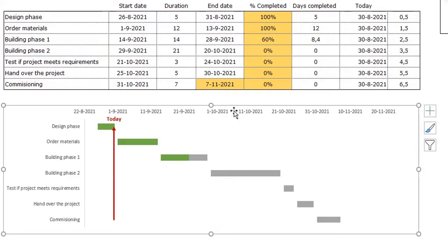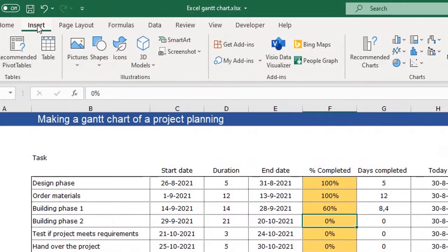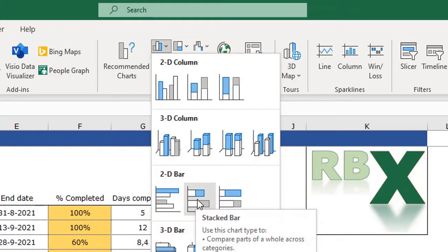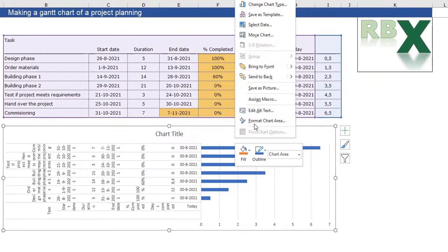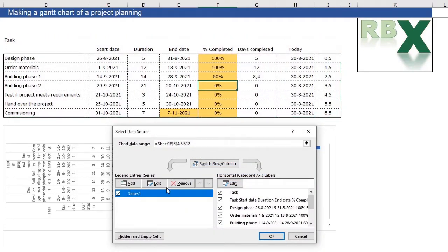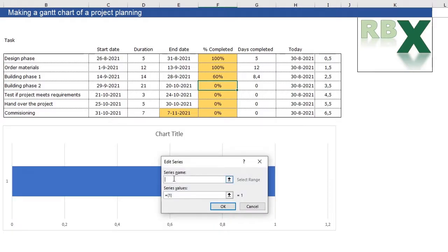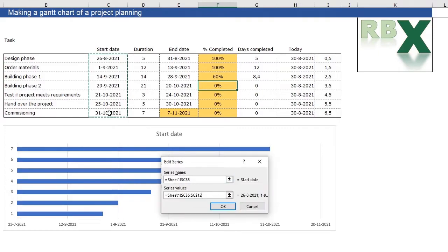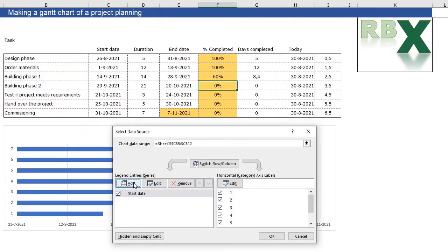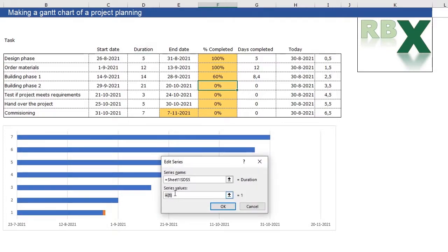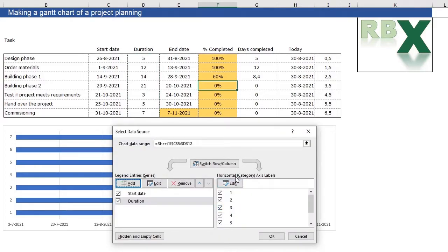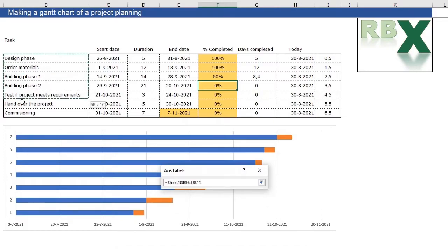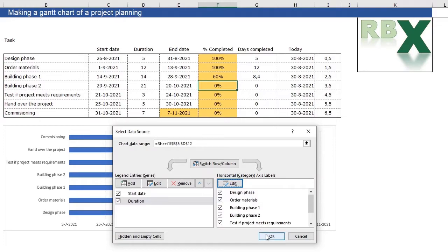I'm going to delete this Gantt chart so we can make our own. First, we insert a stacked bar chart. We need to change the data series, so we go to Select Data, remove the existing series, and add new ones. The first series name is the start date, using the start dates column. Then we add a second data series for the duration. The horizontal category axis labels are our tasks, so we select those tasks and click OK.